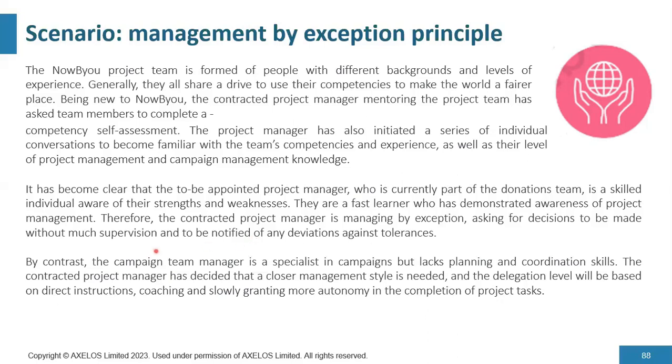By contrast, the campaign team manager is a specialist in campaigns but lacks planning and coordination skills. The contracted project manager has decided that a closer management style is needed, and the delegation level will be based on direct instructions, coaching, and slowly granting more autonomy in the completion of project tasks.